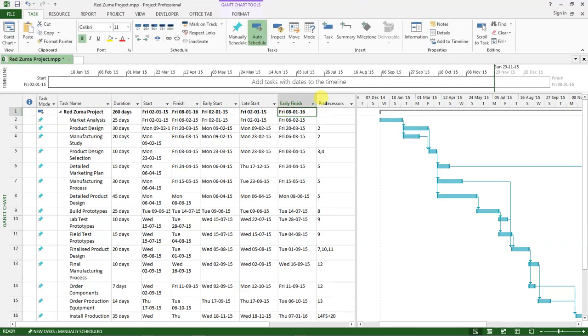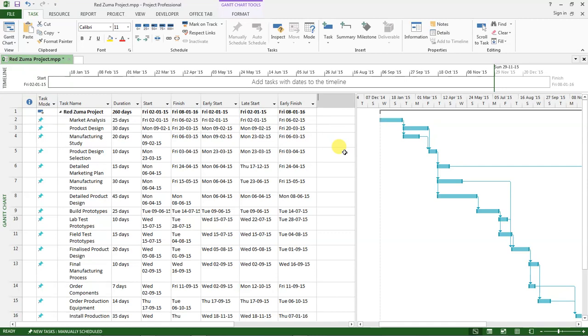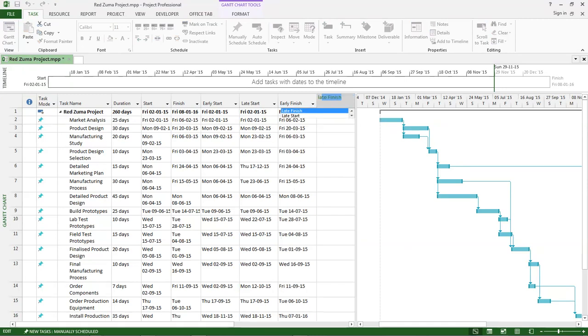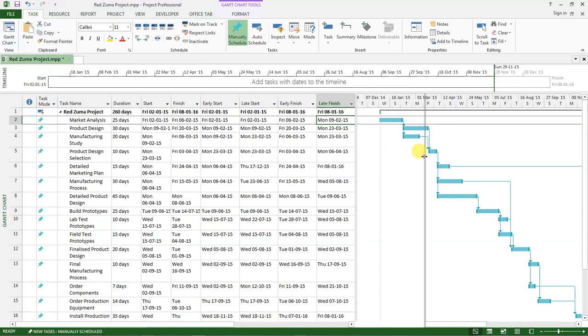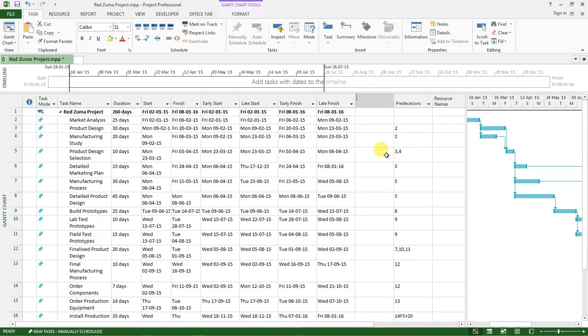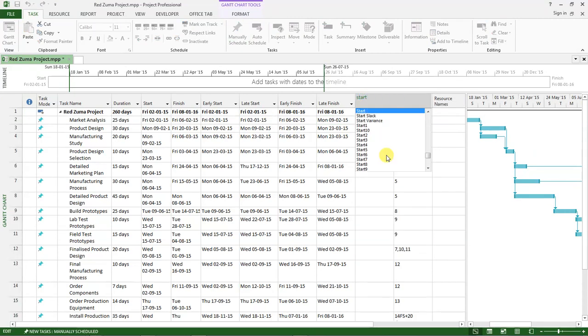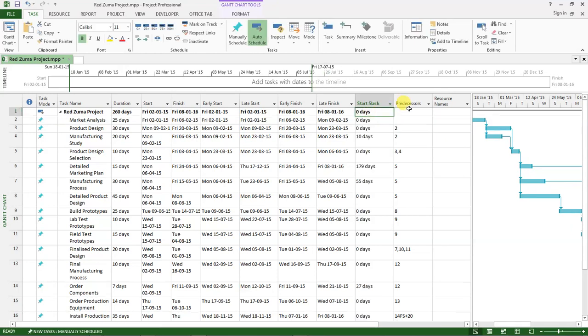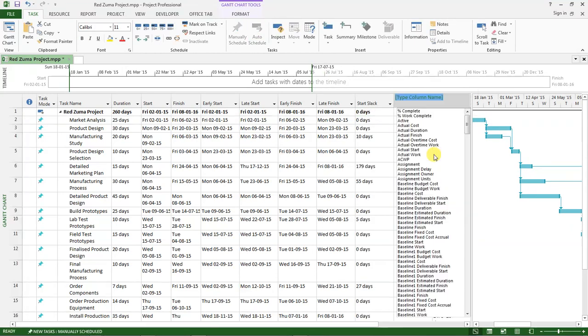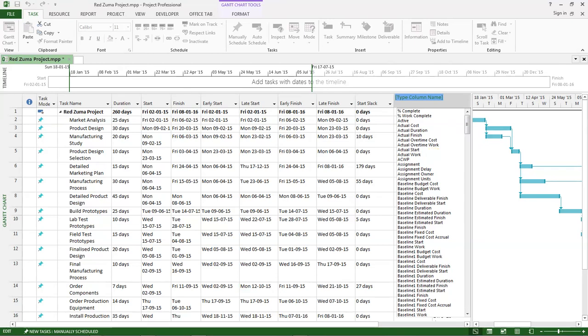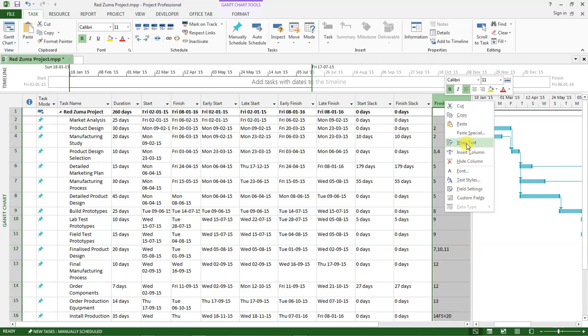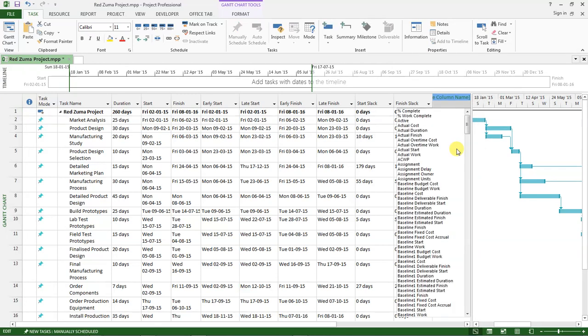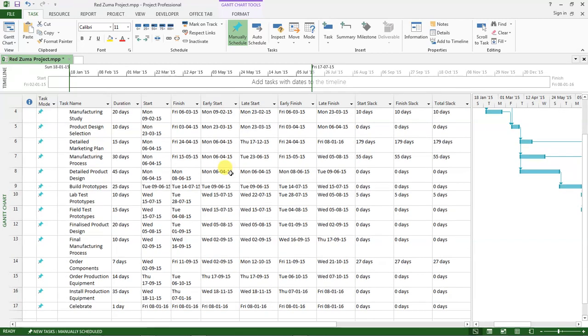Right-click, select insert column, and the next one is early finish. The other column should be late finish. When we are done with that, we go to columns for the slack. Right-click, select insert column and type start slack. Then do the same again and this time around finish slack.